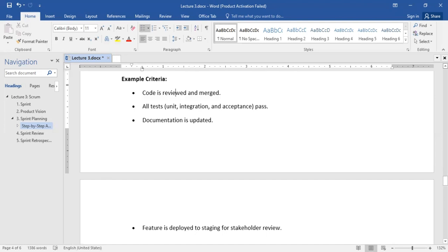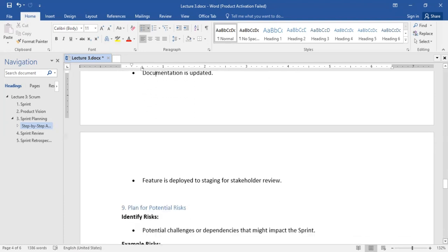Whereas what you were trying to say is that you want them to finish the user story and merge the code together so that there's unity in assessment, and that all the integrations, all the APIs are properly linked and connected. And the documentation tells future developers what is done, what is yet to be done, or what was fixed. So if you come back 3 months after, you can tell that these were the changes that were implemented and these were the criteria that we defined as done.